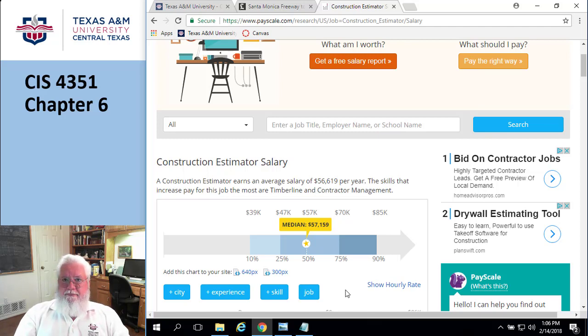So one more time, just because it will only take 5 man hours to do a task, I'm not going to put 5 hours on the schedule, because I will not have the ability to do them all sequentially. It might take me an entire week to do 5 man hours worth of work, because I'm only going to have enough time to do 1 hour of it a day, 5 days in a row. Okay, I've said that I think enough.